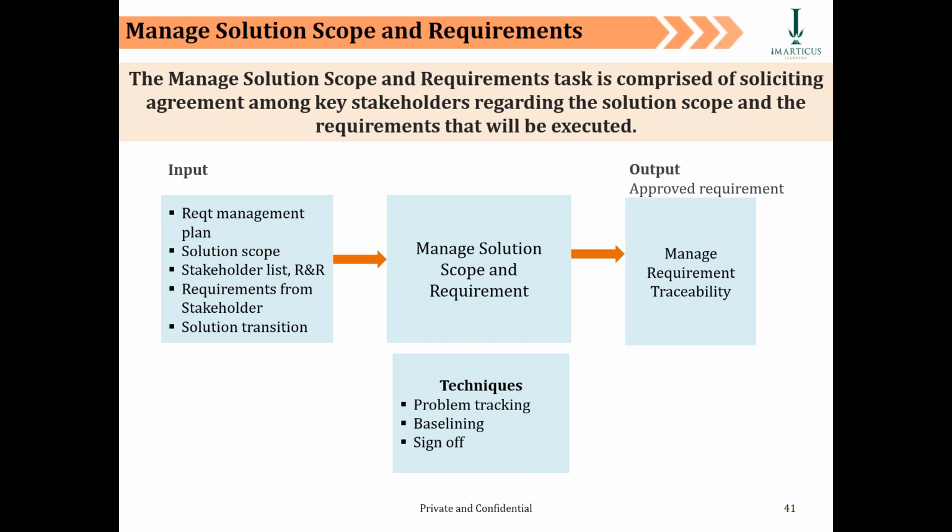And you have a solution scope, right? You know that, okay, from order to cash scenarios, from procurement to pay scenarios, for financial scenarios, for business intelligence scenarios, I broadly know what kind of requirements are typically coming up, but the fact is I just need to finalize them. And by the way, I've taken a rough effort estimate for all the builds and executions of the technical build up and testing, etc. for this project. I know that there is time till next March, so there is a schedule, but it remains only if you stick to the solution scope and don't let the requirements overtake that bridge.